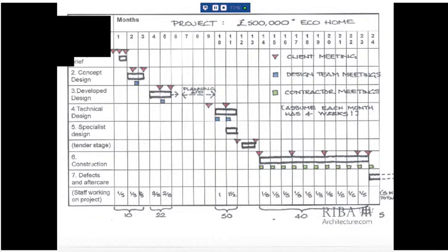You say, okay, well, tell you what, while it's going through its planning consideration period, we'll just carry on with the technical drawings. But it's at your risk, because we can't guarantee it's going to get planning, so we can save a bit of time there. We could negotiate with the contractor, we could save a bit of time there, but all of these are risk items then, and it's the client who's taking the risk, but at least you can have a conversation.